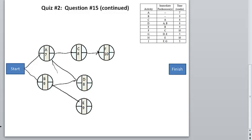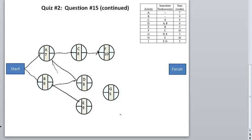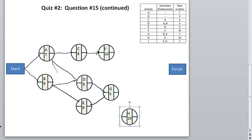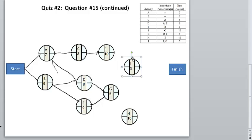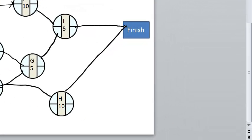So we have A, B, C, D, E, and F. Next we have G. G's predecessor is F, D, and E. I'll connect those here. And H — the predecessor of H is E. And I'll connect that as well.